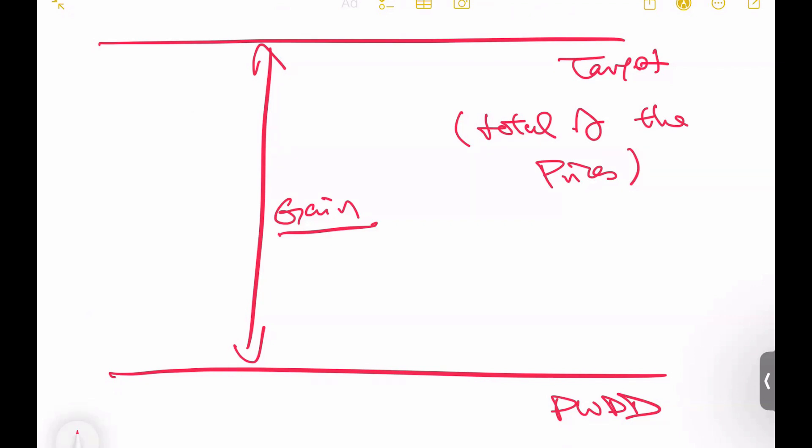If we say we share the gain, how? For example, share the gain 50-50%. So 50-50 split. You, the client, get 50%. I, the contractor, will get 50%. And that is what we call the share percentage. If we are talking about share percentage, a percentage of what? A percentage of a certain range. What range? The gain.